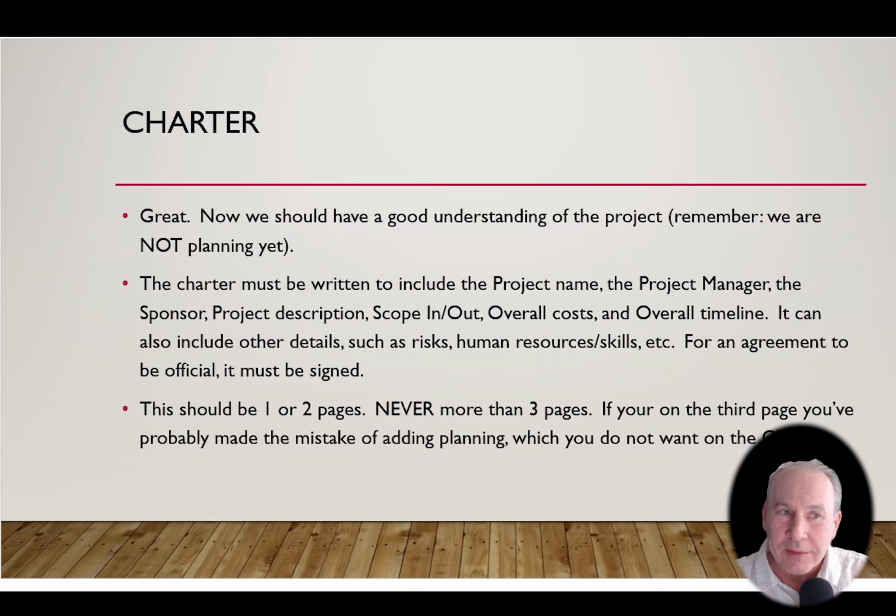So the charter should not be planning. It should only be like 1 to 2 pages, never more than 3 pages. If you're on a third page of the charter, you're probably making the mistake of adding in planning. We're not planning at this stage. Initialization is understanding and agreeing. That's all initialization is. So I hope that makes sense. I hope that's helped you understand project initialization. Thanks.